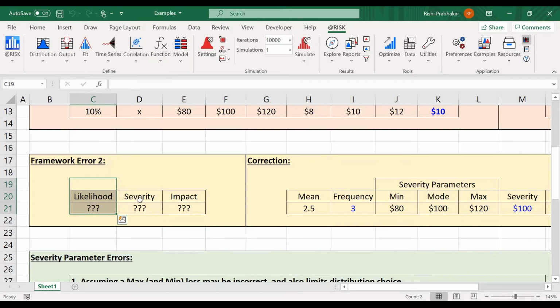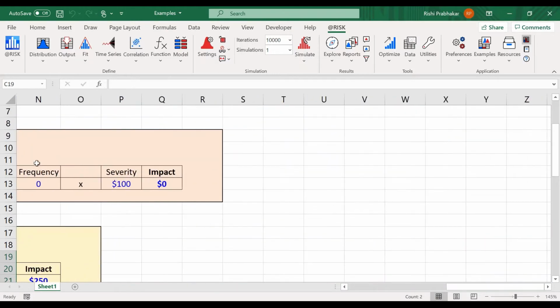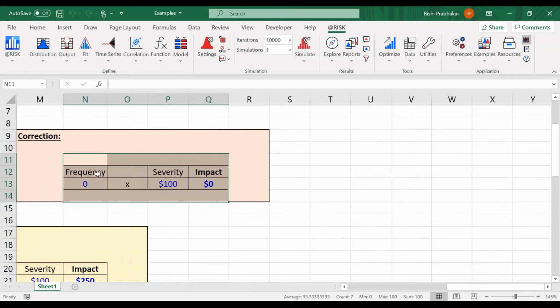I've already used the word frequency. And previously when I used the word frequency, it seemed a little bit heavy-handed. I'm trying to be a bit more exotic than I need to. The only frequencies in that previous event were defined as being 0 or 1. But the fact is it is a frequency, and that is in fact the key. If I model frequency and the only possibilities are 0 or 1, you better tell me the likelihood of that event, and I'll use a Bernoulli function.